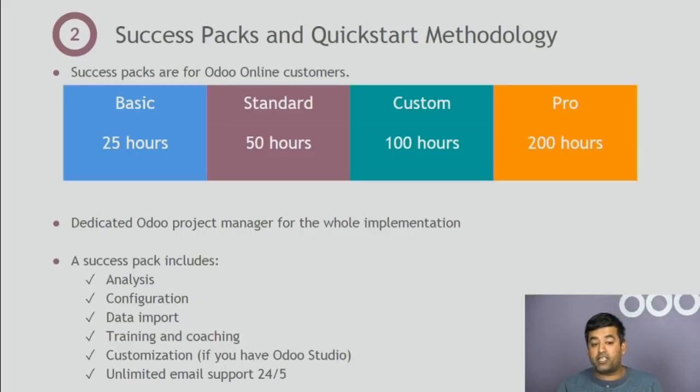Data import. This usually actually takes a large chunk of the implementation hours, depending on how much importing you need to do. And so if you don't need to import 10 years of data, if anything past 3 years is kind of mundane, then we advise you not to, because that takes a large chunk of the hours. And so data import, your consultant can do. You will pull out the information from maybe your current system in a CSV or a spreadsheet. They would remap it to Odoo terminology, so the fields are understood by Odoo system, and they would bring your records, your information into Odoo for you.